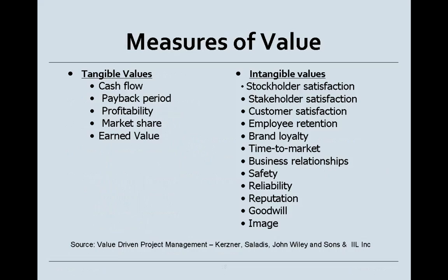Well, I saw that comment on project scope and product scope, and I think there might be a couple of different views on what that means exactly. My understanding is that project scope is associated with the effort required to produce the product, and the product scope focuses on what the product is in terms of its physical characteristics, its features and functions.